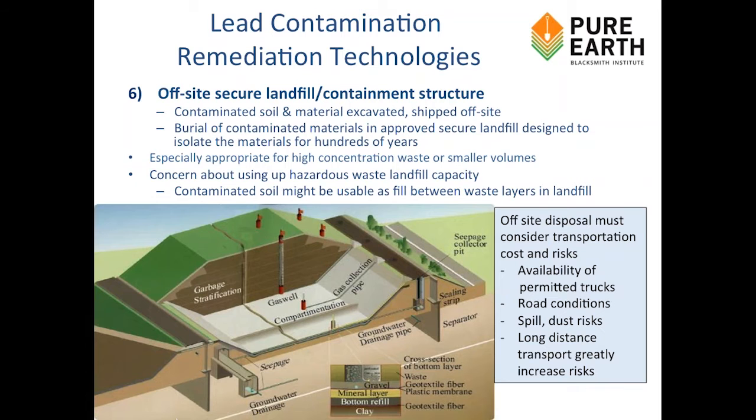Any off-site disposal strategy has to consider the availability of trucks to carry things, the road conditions, how narrow the streets are in the source area, whether you are going through a residential area, that sort of thing. Consider the risk of spills and dust, and the fact that long distance transport significantly increases the risks of spills and accidents or diversion.